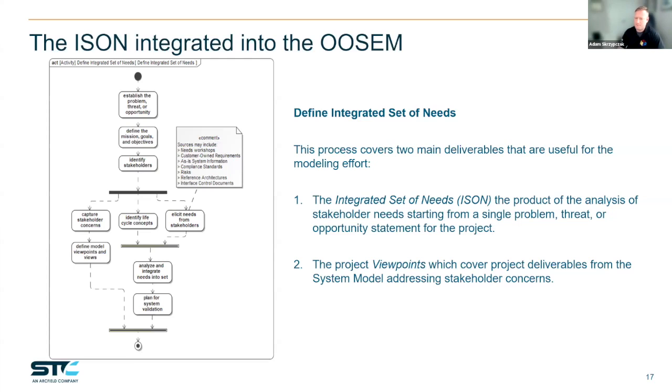So identifying basically the risks to the system, the risks to the acquisition that you're trying to track, would help provide some of those additional needs. One thing I found in working with stakeholders in some development teams is they approach the project as if it's an unbounded thing and we can do whatever we want. In reality, there are a lot of drivers and constraints, budget and schedule specifically, but also identifying the macro system you're a part of. You have to live and operate within that macro system, and that's going to be a source of interfaces. So making sure that is addressed, and it may not be addressed necessarily by the stakeholders you're doing elicitation with. It's just a thought process, a series of activities that the project team needs to go through.